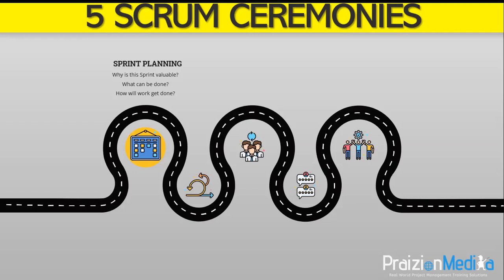Now, remember, coming into sprint planning, if this is not the first time, work has already been done and should have already been done in the previous sprint. Some measure of backlog refinement could have already started taking place, so this might not be the first encounter. In fact, some teams come into sprint planning right at the cusp of ready. Those items are ready to go, so a lot of decomposition may not need to take place in sprint planning.